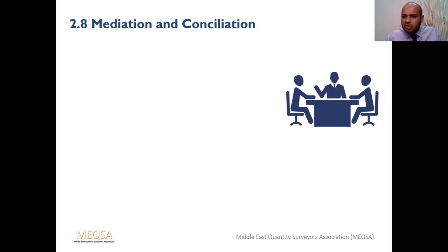In conciliation, he will facilitate, and at the end of the day, if both parties didn't settle their dispute with him, he will give his opinion on the dispute. Theoretically, this is what happens. The same person does the facilitation, and at the end of the day he gives his conclusion or point of view. Then it is a conciliation. It is only theoretical. Practically, it is not like that.